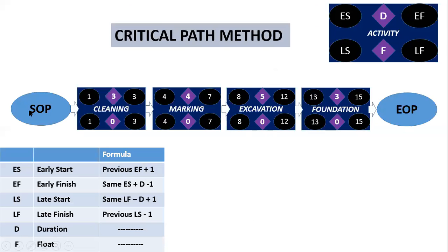We'll be considering this SOP: the early start, early finish, late start, late finish of SOP, the start of the project, are all 0. Getting my words?